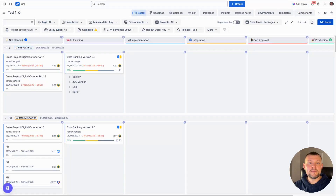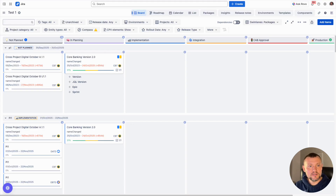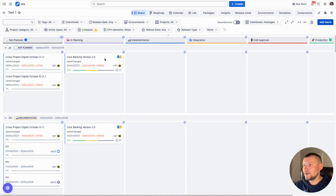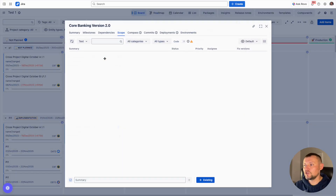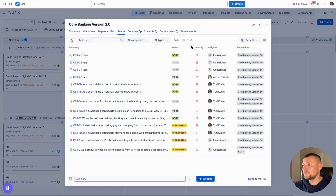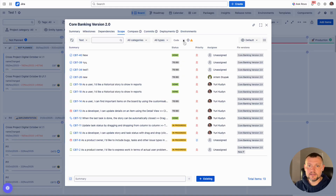As the next step, let's connect release management to the Atlassian ecosystem to get information about commits, pull requests, branches, builds, and deployments. In order to do so, we can click on any version on the board. After that, try to enable the code view — but by default it will be disabled, as in my case. We can click on the attention mark, then click the configure button, and navigate to the link to access the page where we can generate the API token.